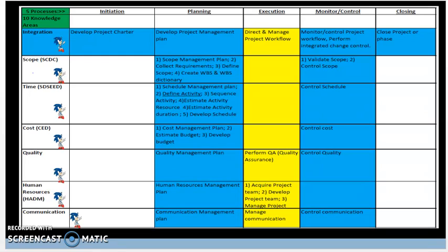Now let's discuss what two possible sources of these risks could be. If we were to overstep the budget, have schedule delays, or overwork project team resources, the root cause of this is usually scope creep or gold plating. Scope creep is externally driven by customers who constantly add new features during a validation session or final sign-off.